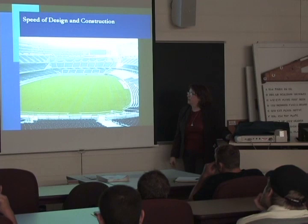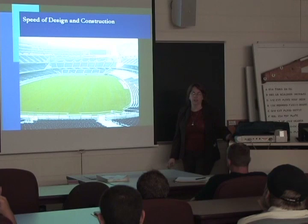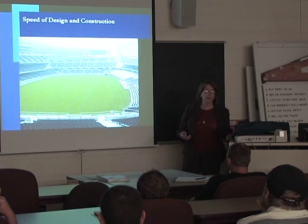So, you know, typically this would have been a 24-month schedule with the parking decks and the stadium. But because of the Bears playing schedule, they had to finish it in 18 months. And they did it. The contractor would have been fined, I guess, $5 million for any games that the Bears were going to miss at the stadium. So they had real incentive to get it done on time.